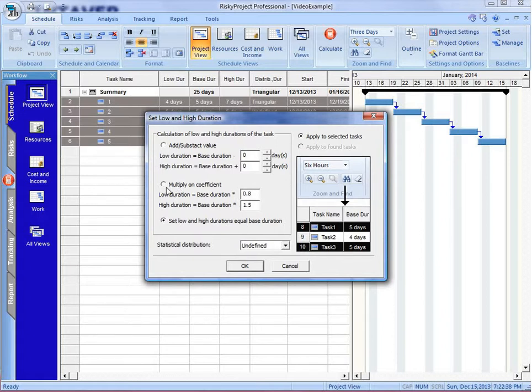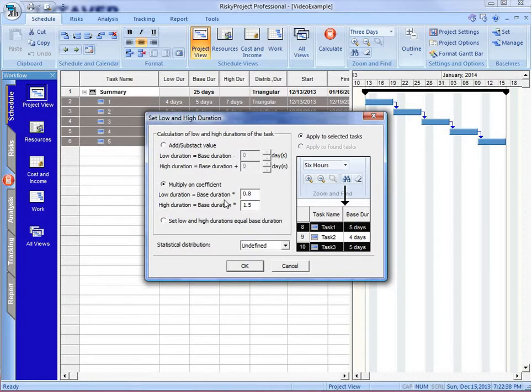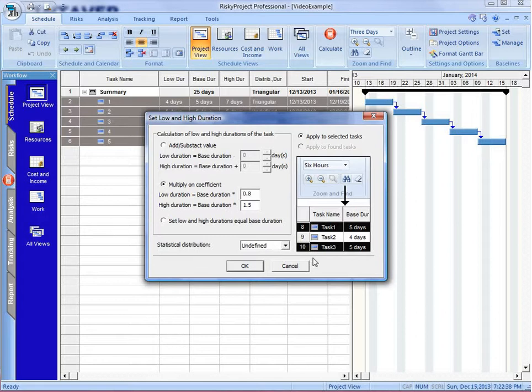What I'm going to do is create a low and high duration for each one of the activities by multiplying it on the coefficients. So if we're on the low duration, I'll multiply that by 0.8, and the high duration, 1.5. And I will also set the statistical distribution as triangular.